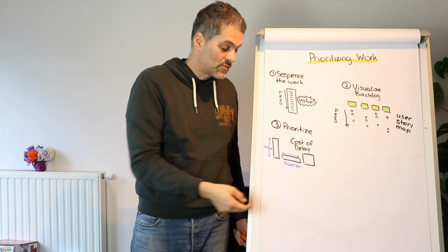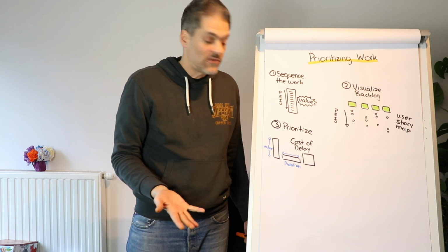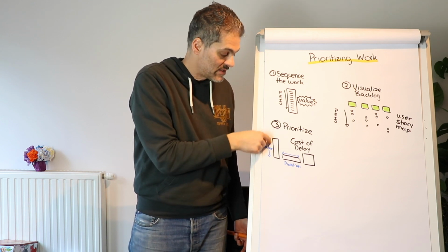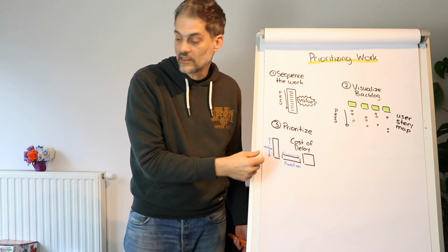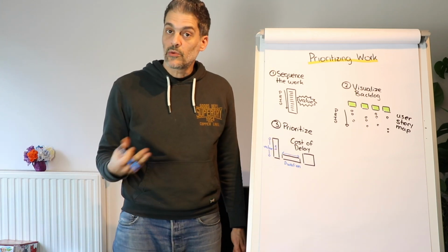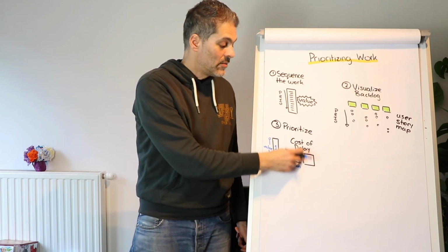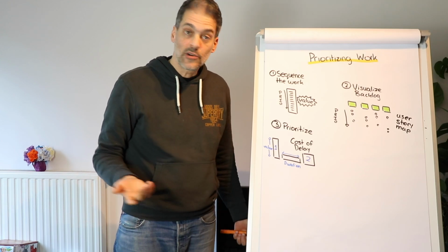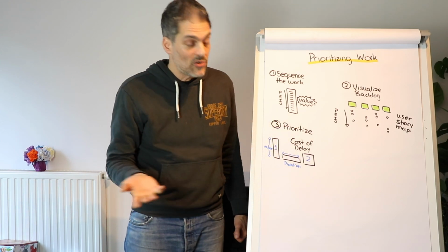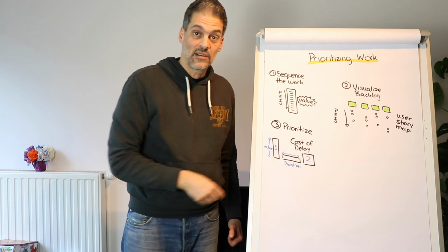So if you take a look at these three rectangles here, which one would we do first, of course? Well, this one here brings in a lot of value and is very short to do, right? It's not going to take a lot of time, and everybody's going to benefit from it. Which one are we going to do second? Well, this one here brings in more value than this one and takes less time. And this one here, of course, will be the third one that we do, or maybe we wouldn't even do it because it takes a lot of time and doesn't bring in a lot of value.